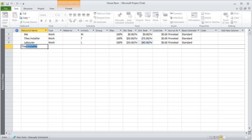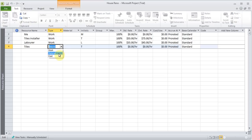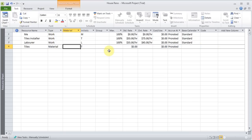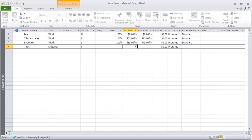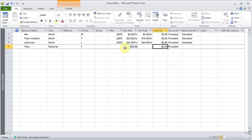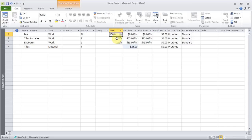I want to put the one for tiles. Tiles will be material. And I'm going to put the standard rate will be, say, it's $25 a tile. So this will be applied every time, whenever the tiles have been installed, will tell them how many tiles will be used. And you see for the work, they have this 100%, 100%. That means they are available full time.